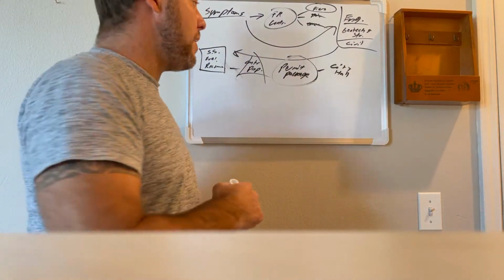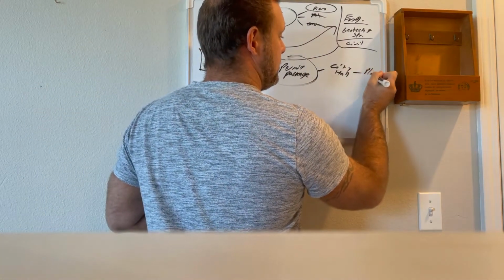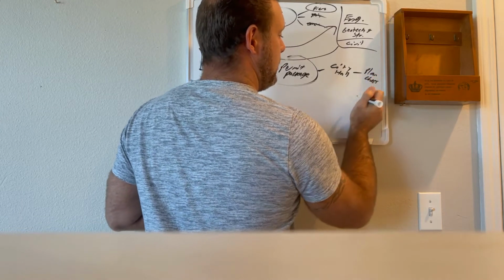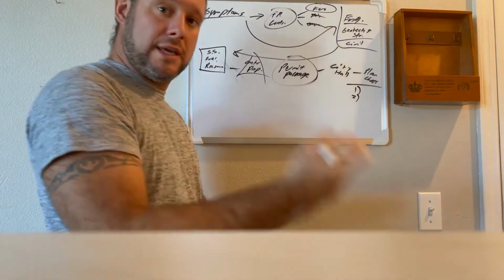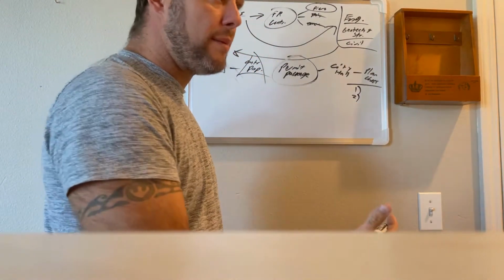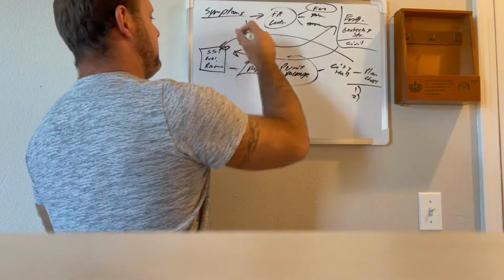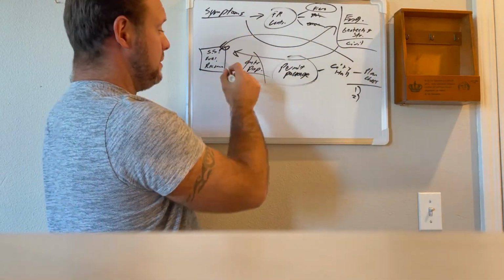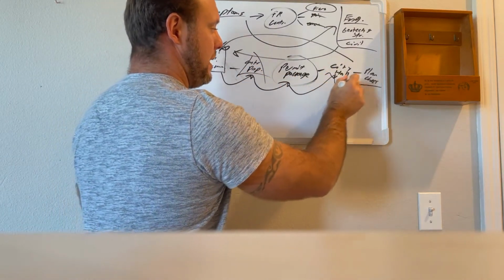Guys, don't be surprised if during plan check you hit one or two kickbacks, okay? That means they say there's problems with the plans. Every time they do that, it goes back to the engineer. He makes changes to the design. He talks to the contractor. The contractor puts it in a permit package. You take it to City Hall, and you do this again.